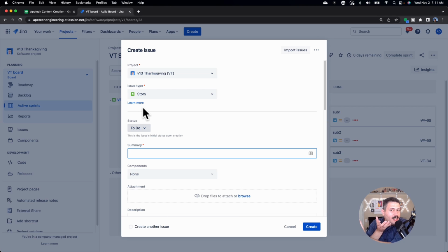Now, the bug is very clear. The bug, even though they're siblings as well, is usually very, very clear that it's for a defect, for something bad. But the story and a task don't usually have that big of a distinction. So, my recommendation to you is reserve the story for value added work, something that needs to get done, something that describes what needs to get done, but value added. And then we have our task, something that needs to get done, but has no value added.